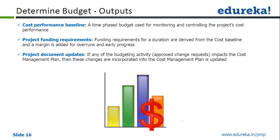Cost performance baseline — or cost baseline as per the PMBOK — is a time-phase budget used for monitoring and controlling project cost performance. When you actually start spending, you compare it against your cost baseline, which is part of your project management plan. Another output is project funding requirements — these are step-by-step funding releases, and funding requirements for a duration are derived from the cost baseline S-curve, with margin added for overruns and early progress.